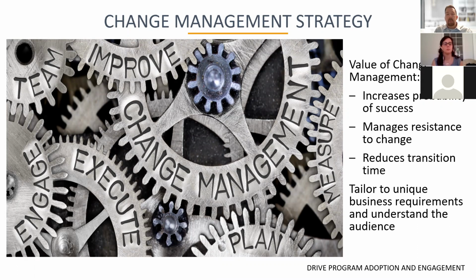In every case, I don't necessarily see an incredibly formalized plan, but I am encouraging you guys to make these as distinct and strategic as possible. So a communications plan, a sponsor plan, training plan, mentoring and coaching plan is key, and then resistance management, because we all know that folks are going to resist change. And when developing your change management strategy, make sure it's in direct alignment with the project's business case.